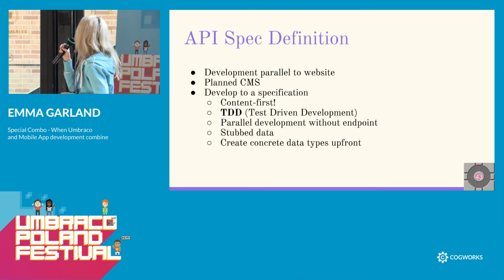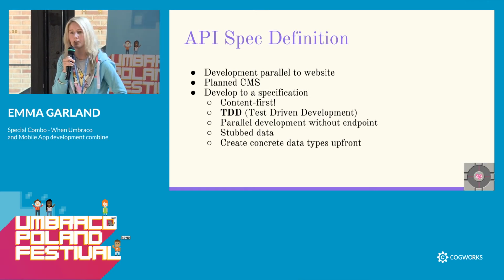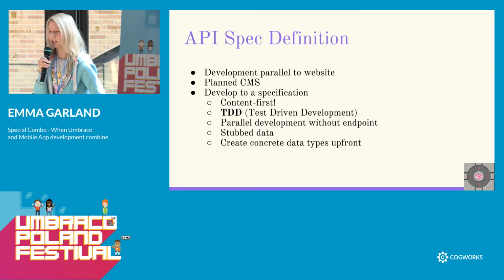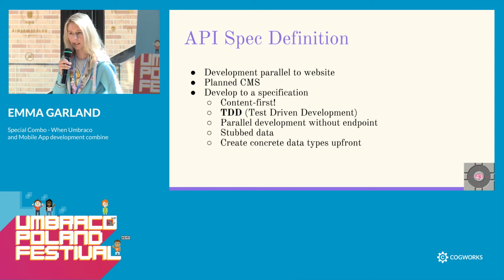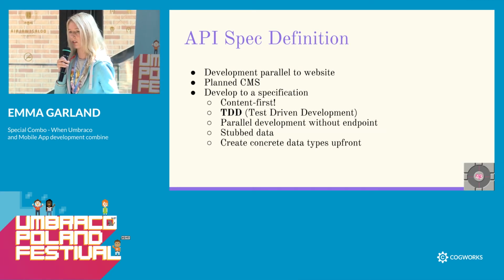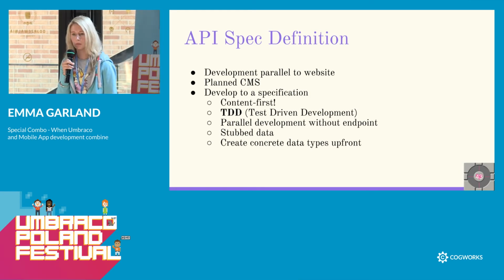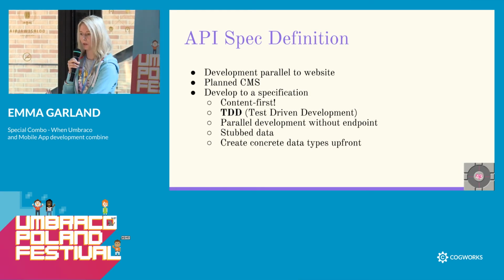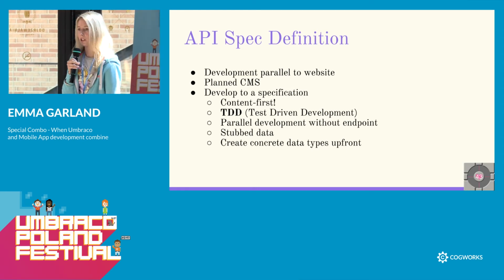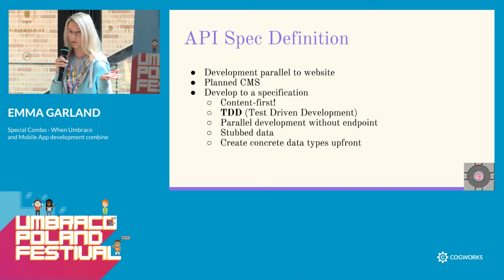So I mentioned earlier how important it was to have a spec for your API. And I think this was probably the key in how we managed to get everything finished successfully within a month. Basically, we could start development without holding up the mobile team. So we all knew what API we're going to expect. Chris could then go off and build his code using some stubbed out data, because he knows ultimately what he's going to get back.